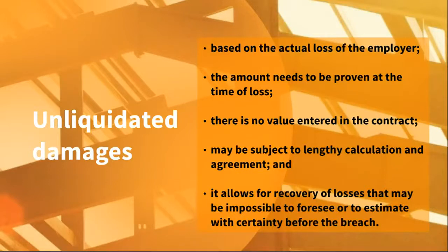Where unliquidated damages are applicable, the parties may be subject to lengthy calculation and agreement. However, the advantage of unliquidated damages is that it allows for recovery of losses that may be impossible to foresee or to estimate with any certainty at the beginning of the contract, when there was still no breach.